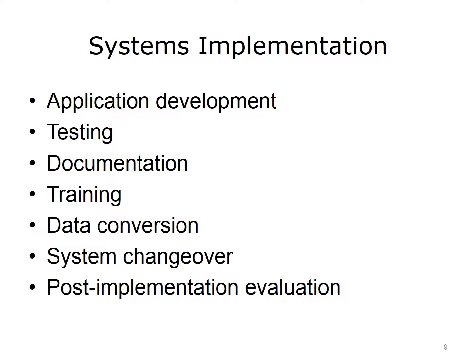System changeover is the process of putting the new information system online and retiring the old system. Before the system changeover can occur, the new system must be tested and documented carefully, users must be trained, and existing data must be converted. The changeover can happen quickly or slowly depending on the method used. Direct cutover, parallel operation, pilot operation, and phased operation are examples of changeover methods. Although these methods are not covered here in depth, they provide an indication of the complexity of systems implementation.